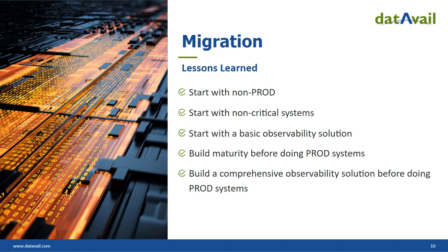During the migration phase, we want to start with non-prod, to get some lessons learned and experience. Start with non-critical. Even though it's non-prod, if you have a regular development release going on, it becomes critical that even non-prod stays up. That's why we start with non-prod, non-critical, then go for critical systems which are non-prod, and then production.